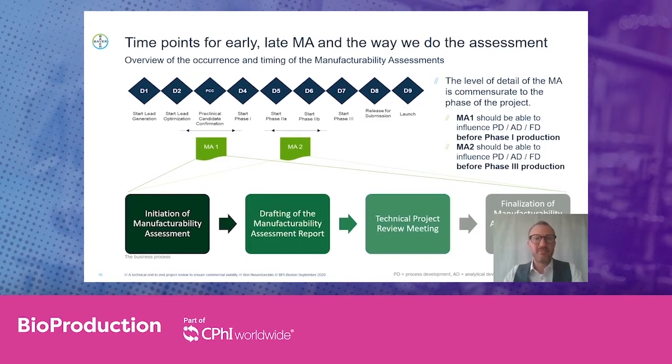Identified risks must, at this point, not necessarily be mitigated, but they should be prioritized and, if needed, carried to later milestones, for example, lifecycle management activities after launch. So overall, the aim is to generate agreement and transparency on the risks by all relevant stakeholders of the workshop. The technical review meeting is concluded in a report that is collaboratively written by the participants of the workshop, with a list of recommendations on how to move forward.